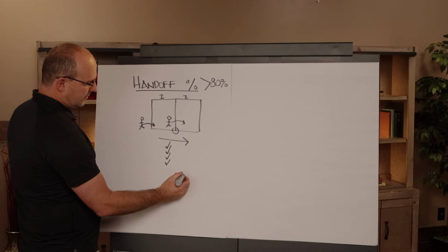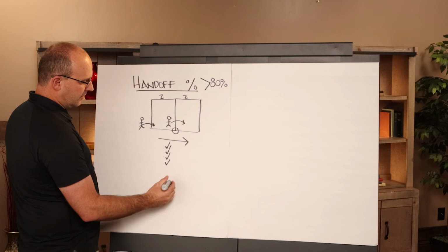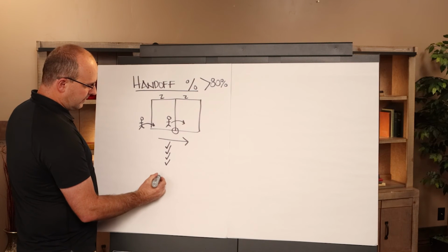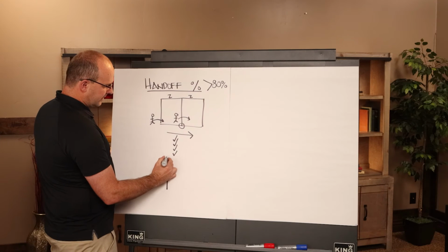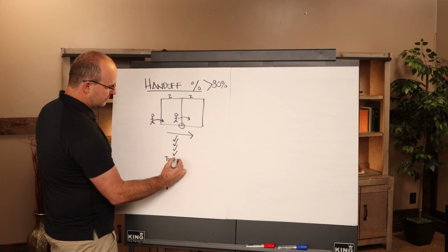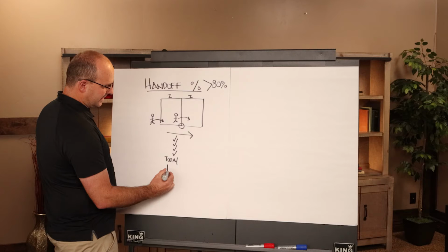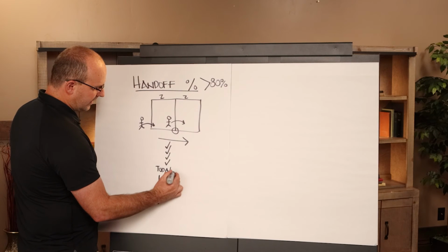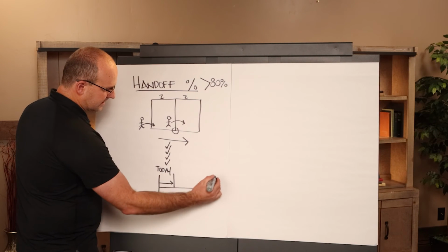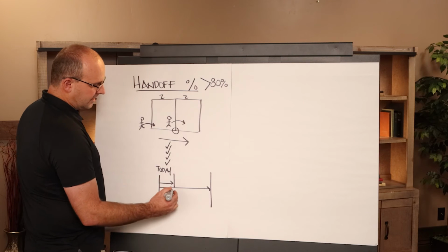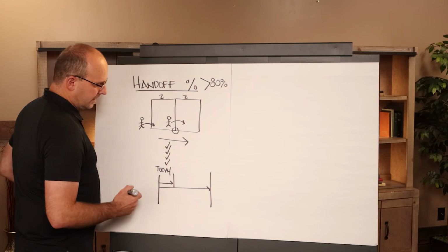So let's say that, and you can look at it either direction, however you want to look at it. Maybe I'll just draw it in the way schedules are typically written. Let's say that this is today. So this is what most people would call a data date. And you're looking out a week in advance for your weekly work plan. And you're also looking out, and this isn't exactly to scale, but you're looking out 6 weeks ahead with your make ready look ahead plan.